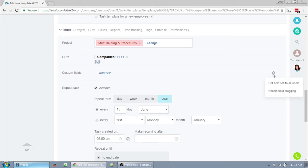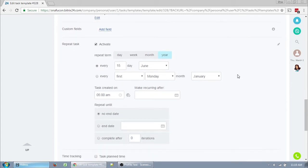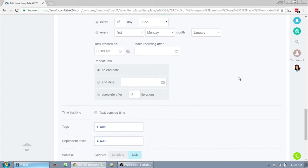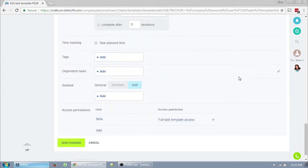If you click this gear to the right, there's an option that says Set Field Set to All Users. It means that this field will be set up for all users. If it's not selected, then any custom fields are for you alone. As long as you don't have a base template assigned, you can click the checkbox next to Repeat Tasks and set up the recurring settings. This particular template I had already set up as a recurring task in the previous video, so it's already activated. If you're setting up a roadmap of your annual tasks, you can set them up as early as November, so that the following year's tasks generate, and you can review and update right after con.